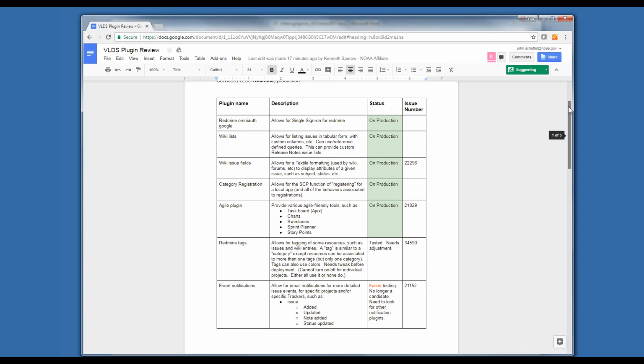But within native Redmine, you don't have a way of saying, oh, Ken, this is his schedule, and right now he's slated to do 40 hours of work on Monday. Well, that's clearly a red flag that I'm not going to get all that work done on that day, and that work needs to be distributed either to others, or the dates aren't realistic.